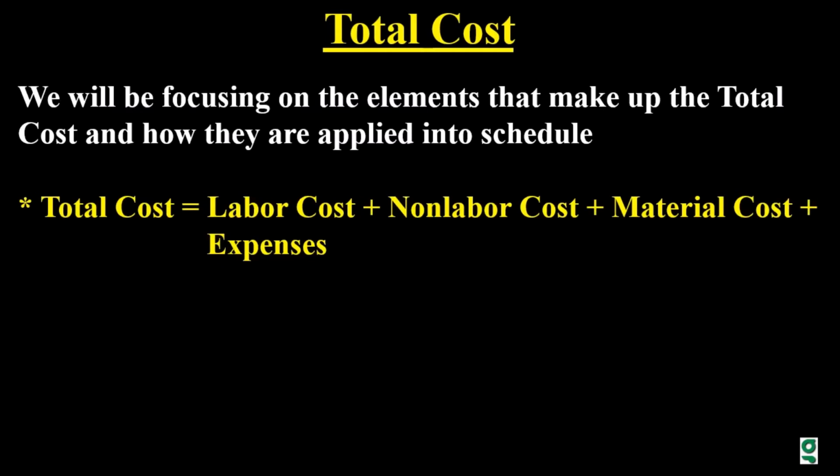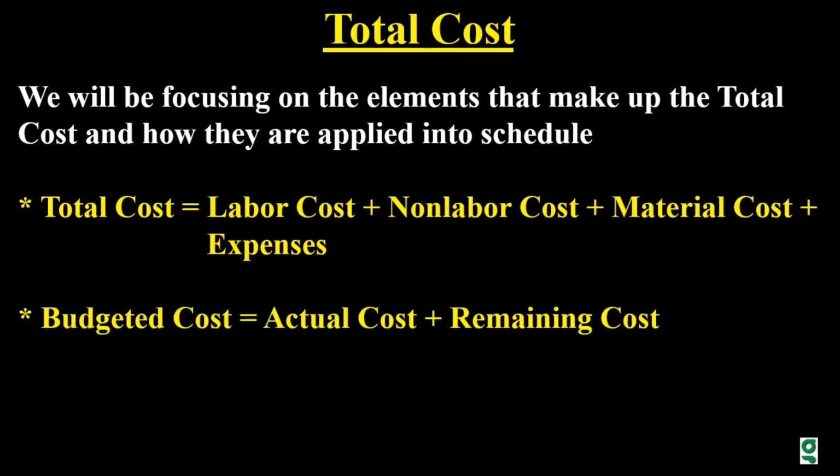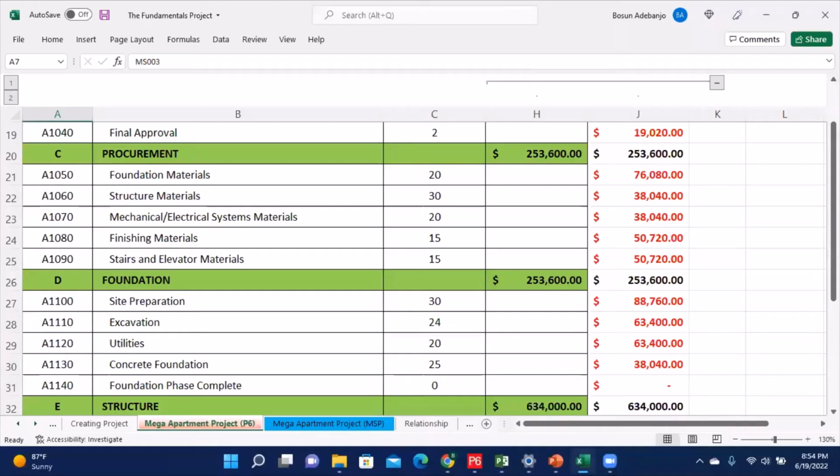plus material cost plus expenses. Also, any of these costs, regardless, we can also say that the budgeted cost of any of these costs is equal to the actual cost plus the remaining cost. Now is demonstration time.